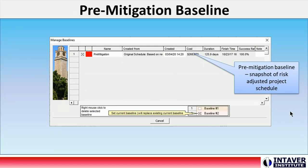To start the analysis of mitigation efforts, create a pre-mitigation baseline. Baselines are essentially a snapshot of the schedule. This provides a reference that allows us to compare different mitigation strategies.